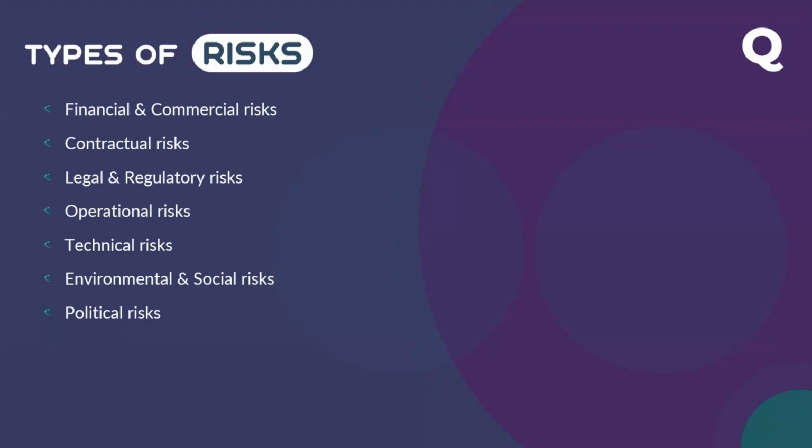And political matters, which are beyond your control, are addressed in force majeure or employer's risk. But again, that may not address war, hostility, or communal issues. If that is not addressed in the contract as employer risk, you may need to address that. Guys, I would appreciate it if you could go to FIDIC and see what the employer risks are in the contract. If those risks are not identified as employer risk, that's a political risk for you.